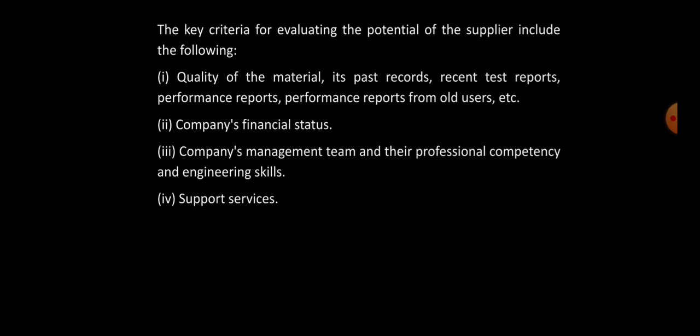The key criteria for evaluating the potential of a supplier to deliver the right product at the right time should include the following points: the quality of material, its past record, recent test reports, performance reports from old users, etc. The company's financial status, so as to maintain a continuous supply.